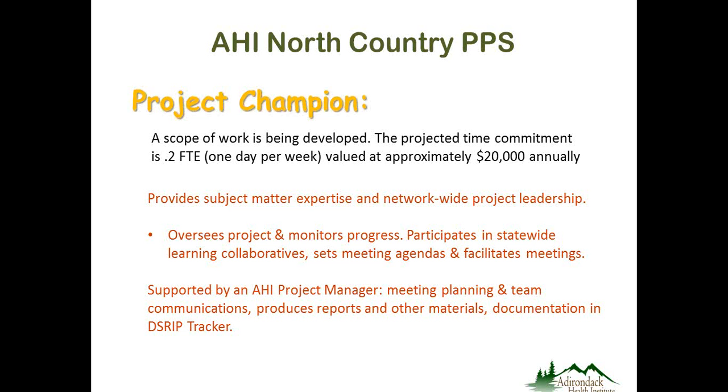So there is a scope of work that we're developing. The projected time commitment for a project champion during this first year, because there's so much work to be done with implementation, is approximately 1 day per week, valued at approximately $20,000 annually. This is a cost that we've budgeted for in the current implementation grant.